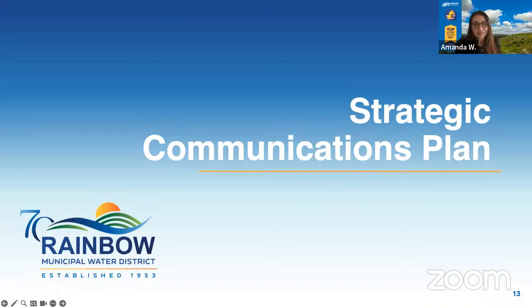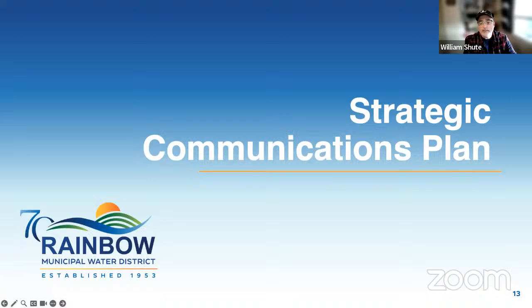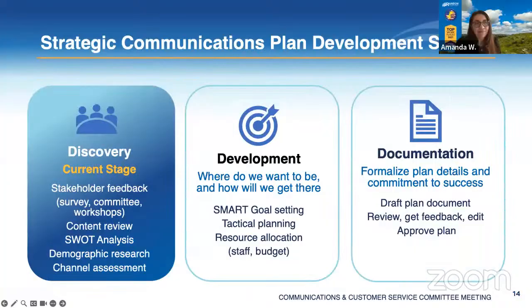Okay, moving on then to item 14, the strategic communications plan. Okay, right now we are in the discovery stage. We are going to be soliciting our team members for feedback, and we're going to review our current communications materials, perform a SWOT analysis, use demographic research from the 2020 census, and then make a channel assessment. And after we've done that, we'll move through the development and documentation stage.